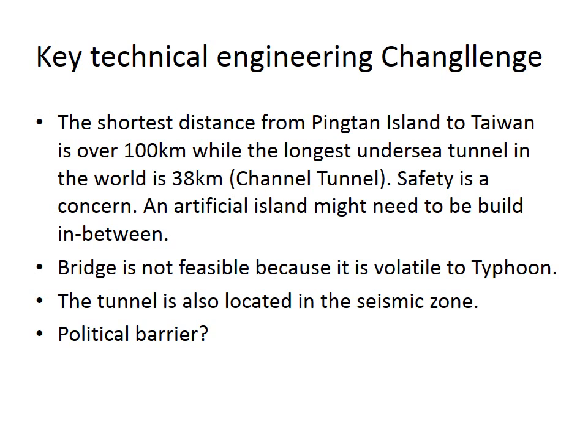And so, we might propose an artificial island in the Taiwan Channel to reduce the tunnel length. As well as reducing the tunnel length, it can also reduce the duration of the program, because if we build an artificial island, then there will be four TBM machines which can be operated simultaneously.